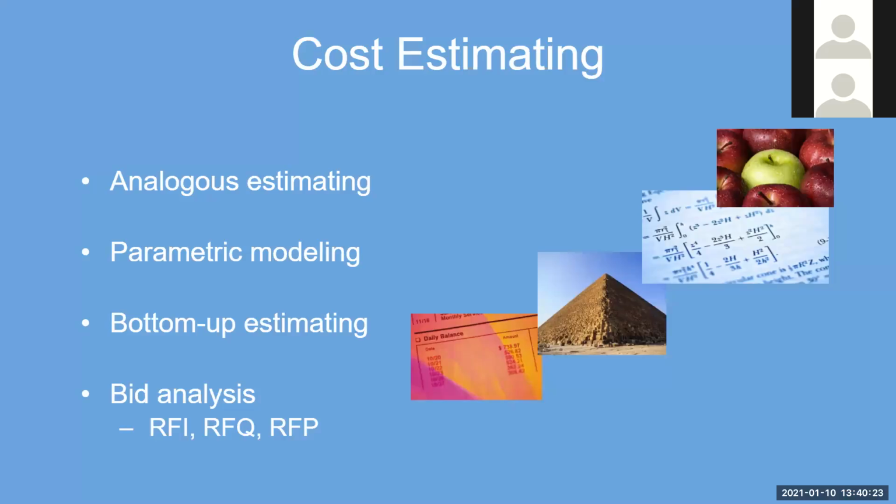That's correct. I mean, there's the PERT method, which I feel like would actually be really good. I feel like that one would be really simple because you just have to add up P, the most pessimistic, the worst possible scenario, plus 4M, the most likely, plus O, which is the most optimistic.